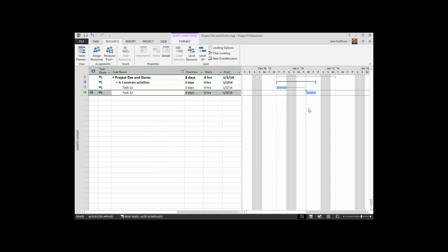So what this is doing is it's locking this second activity to this date. It can't start any earlier or be more aggressive. Project cannot schedule any earlier than a particular date. It can move it forward, meaning in the future, but it can't move it back in a more aggressive style. So if I make the duration of this top task 5 days, it can push the task out 7 days. Here's 7 days. So the task goes out, but if I were to make it, say, a half of a day, or maybe even less, 0.25 days, it's still not able to schedule the task earlier than the constraint date.